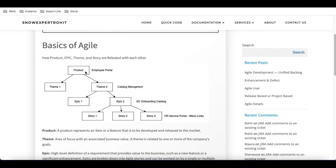The product has a user called the product owner, who maintains it. The product owner also has access to all the lower modules called theme, epic, and story — they can read, write, edit, and create them. The product owner holds the role scrum_product_user, which gives access to modify all these lower modules.